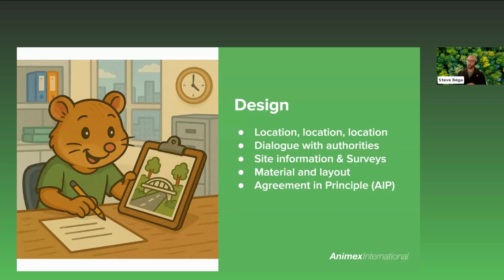And then once all this is designed, we have a clear plan for how the entire bridge will be built and whereabouts that will be. Then after the design is complete, it proceeds to approval and then onto fabrication and installation from there. Now, again, at every stage, it's important to maintain that open dialogue with authorities, typically road agencies, as well as planning authorities in your region, because it's much better to get their input early than face costly delays and redesigns later. And just to highlight a few common topics that are often raised during design discussions.